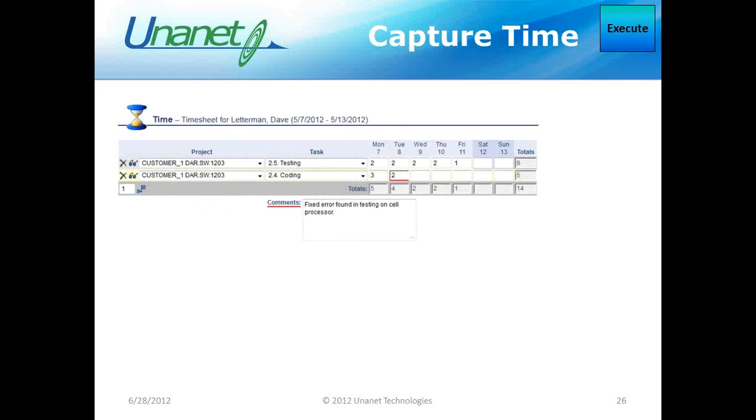Of course, the timesheet should look very familiar to most of you with the time license, only allowing a user to charge time against projects that he or she is assigned to, and the ability to constrain charges for task date ranges and budget number of hours. Comments for each time cell can further detail the work assigned and can be required even upon saving the timesheet. And you also have audit trails that can be used to determine reasons for any of those changes. These are all settings that can be tailored per your business rules for strict enforcement of the budget and schedule of work assigned, or maybe not, you don't want to be so strict.